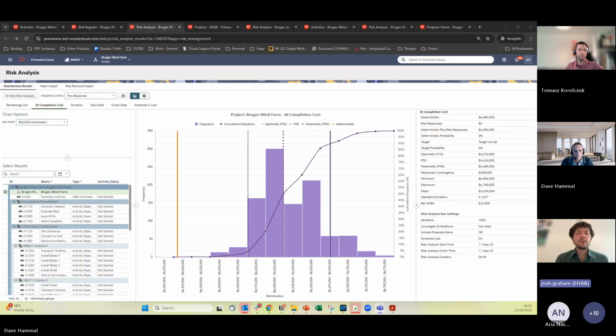No, absolutely, and of course we always encourage that users should not just rely on the defaults. The defaults are a good starting point. You should set your own thresholds. I mentioned that research about wetness because once you start to dig into whether it is 10 millimeters or 5, you realize that there are other factors for rainfall that determine the impact.